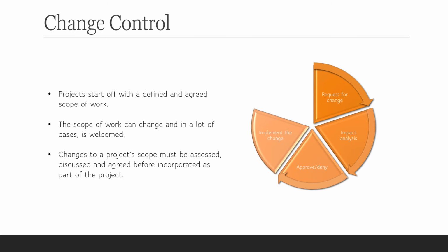You update your business case document, you update all the necessary documents within your project space. You're implementing that change, and then you go ahead and you plan to deliver this change. Like I was just saying, once you've taken all of these things into consideration, you update your plan, your project budget, your business case, your project initiation documentation, your high-level design, low-level design, all the things that need to be updated to be able to incorporate this change.